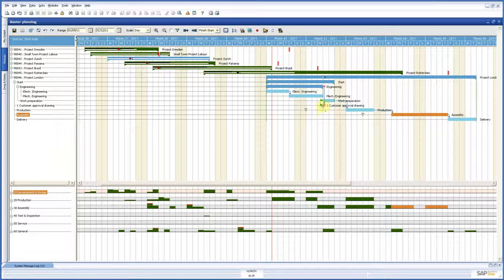And the last thing important for this planning project is this icon, the green and red symbol, which represents a milestone, and you can also see that milestone on the project bar above. Milestones are very important. They can mean very important steps in your project, and in this project bar you can have a couple of milestones, and one of the things you can do is link invoices to this milestone. So what could be here is that if this milestone is finished, you can send your first invoice, for instance. So that's a very powerful tool as well.